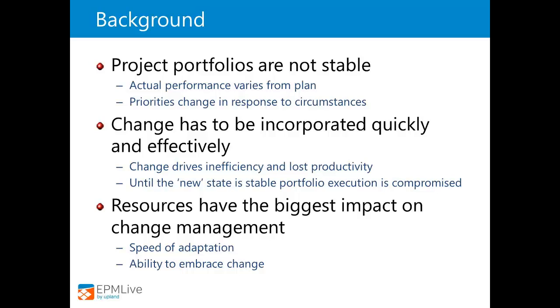If we don't have that, then we need to look at our forecast and say, when do we need those skills to come on board? When do we need more people available? Because we need to be able to plan for that up front. We can't hire people on a Friday and have them available on a Monday. We have to recognize that it takes time to bring people on board.